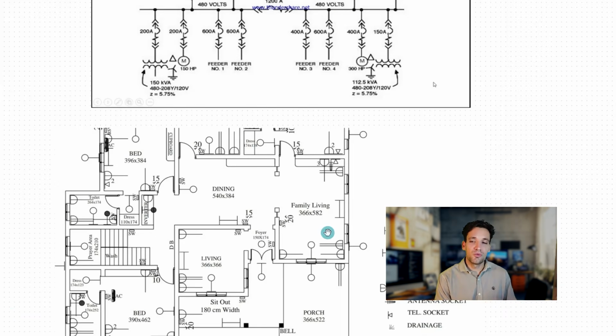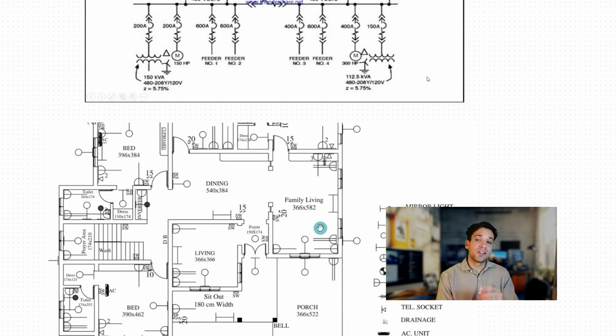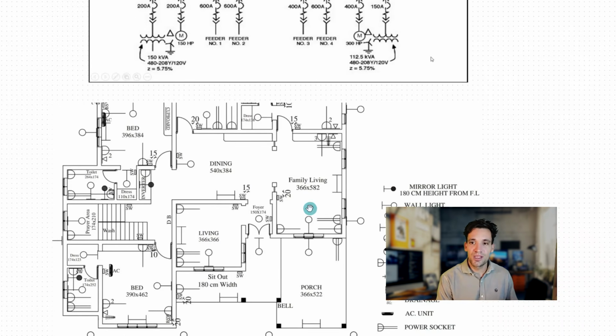My general rule would be that if the information is provided in the design package, you rely on that information. So for example, if they give you a cable schedule, I wouldn't create another cable schedule to cross-check that. I would rely on the cable schedule that's been issued by the client.